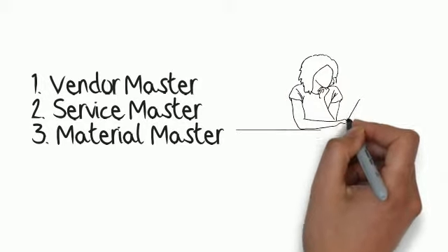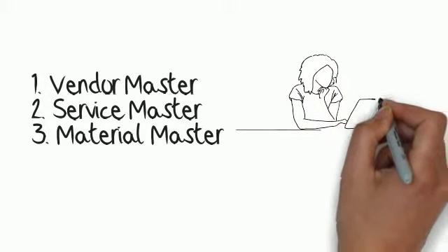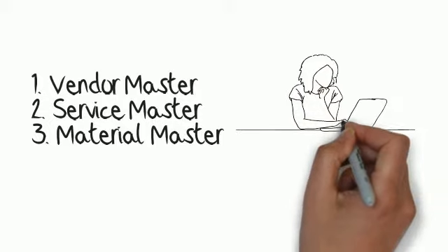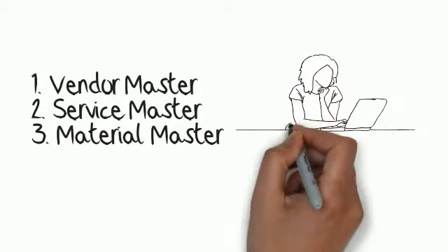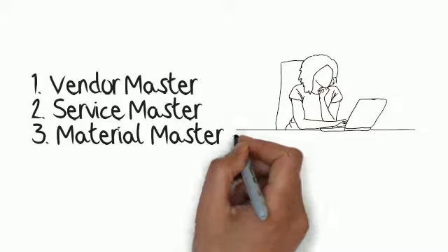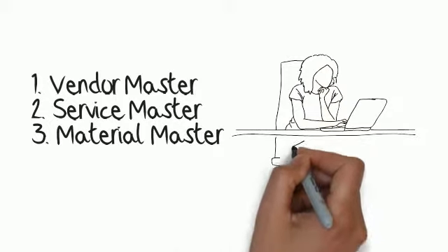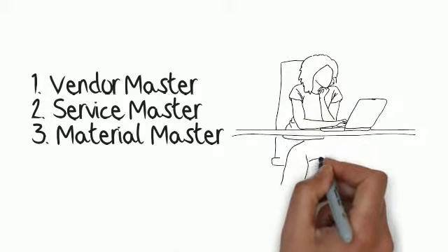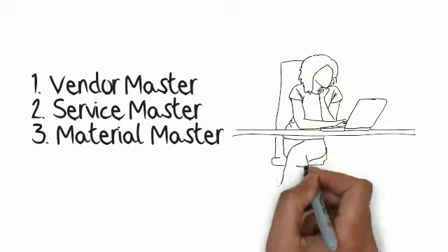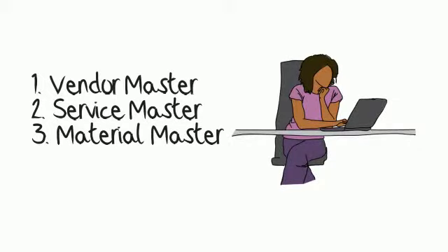If the master data that you require doesn't already exist, then you must request for it to be created. The process to create master data can take quite a bit of time, so make sure that you put in the request as soon as possible. You can learn more about master data in the SAP requisitioning courses.